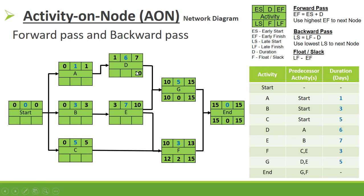For D: late finish = 10, float = 10 - 7 = 3, late start = 10 - 6 = 4. For E, the incoming late starts are 10 (from G) and 12 (from F). In the backward pass we use the lowest, which is 10: float = 10 - 10 = 0, late start = 10 - 7 = 3.